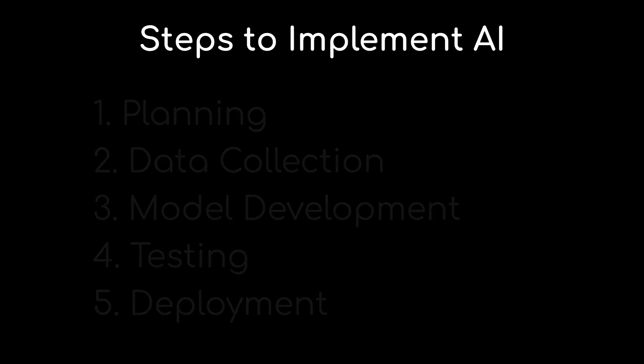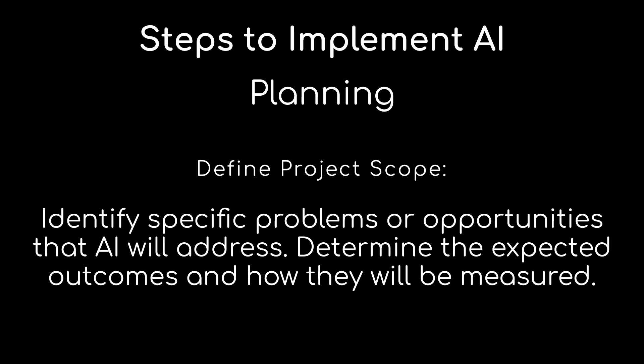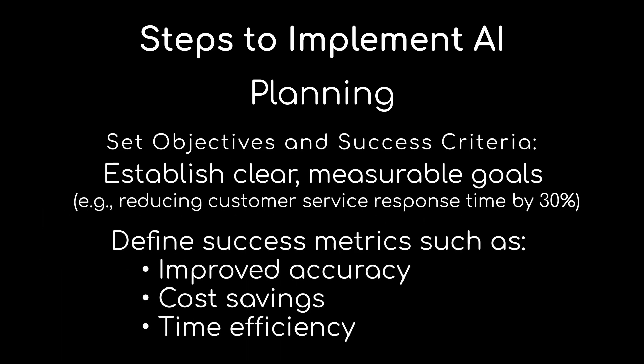When we look at how we're going to plan this out, first things first, we're going to define our project scope. We're going to identify the specific problems or opportunities that AI is going to help us with, and look at the expected outcomes and how we're going to measure them. Next, we're going to set the objectives and our success criteria — establishing clear metrics and goals, like reducing customer service response time by 30% or closing help desk tickets by 50%. You can define success metrics such as improved accuracy, cost savings, and time efficiencies.